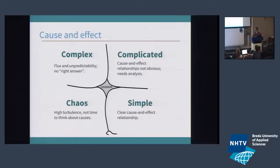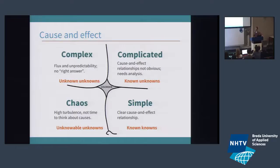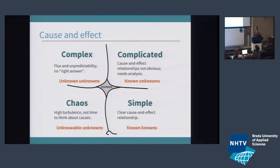There are different kinds of problems, different kinds of risks, and you should take this into account when describing the risk. There's a matrix: you have known knowns, but there are also known unknowns — things where you know that you don't know about them yet. The complex ones, unknown unknowns, are often where you really miss major things. So if you're doing the brainstorm, try to come up with what-if scenarios. What if this system doesn't work? What if it works brilliantly and we want to add on it — does that impact other systems? Through hypothetical reasoning and brainstorming, you could catch some of these complex problems and get them into the known sphere.